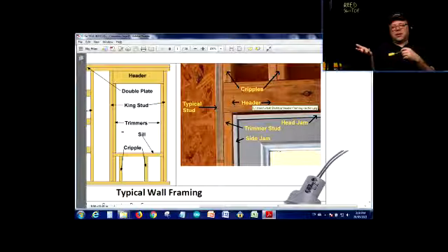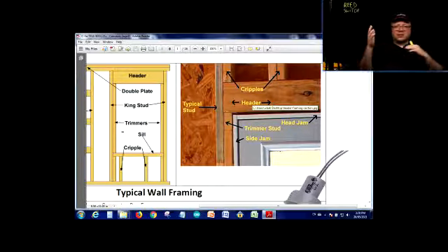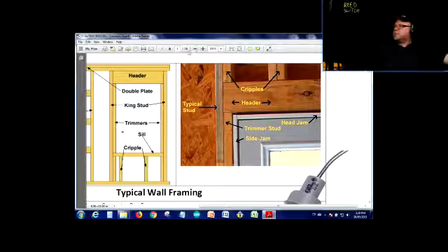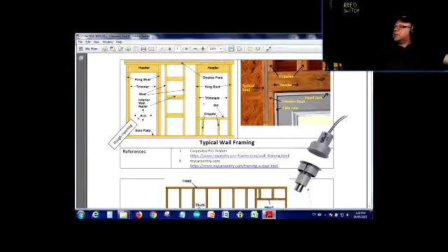But just think about it. If you're running wires, you're spending the time of routing the wires through the walls and connecting them and terminating. The device costs less, but you charge more for labor. So it comes up to the same thing. With the wireless device, you charge more because it's more expensive, but you are not using all that time to run the wire to it. So those two things balance themselves out. Right? Okay, so let's zoom out a little bit here, see what else we have.